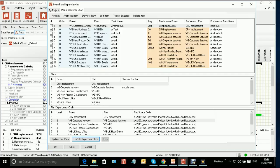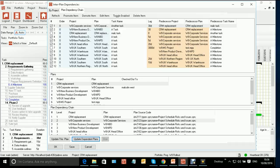And you would get that message whenever you checked out now and checked back in the CRM replacement plan because of that knock-on effect as it works its way down through the dependency chain. In fact, any user checking out and checking back in again the CRM replacement plan would get that message. And so these may start to pop up from time to time. It's indicating to you that there is a problem with that chain because somebody's got something checked out. And you can simply solve that by coming to here, seeing which plan it is, who's got it checked out, going and sorting that out, getting it checked back in again, and then you'll be able to progress through the chain properly.